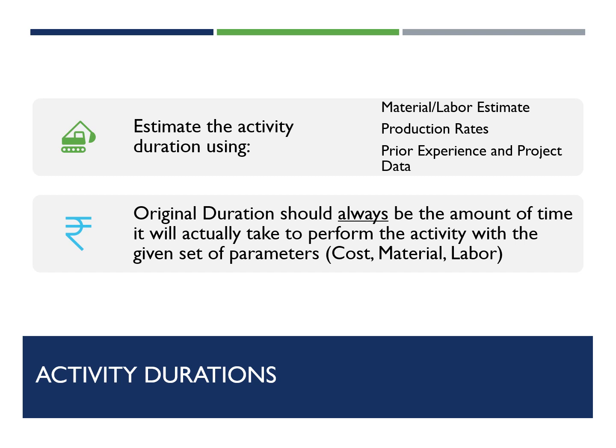How do we determine activities? So when you're putting your bid together, you should have a pretty good understanding of what your trade's production rate is, what you're expected to do, and how much you've got to do. So we're going to want to know what's the material, what's the labor estimate, what are the production rates for the particular labor that is going to be installing the material.